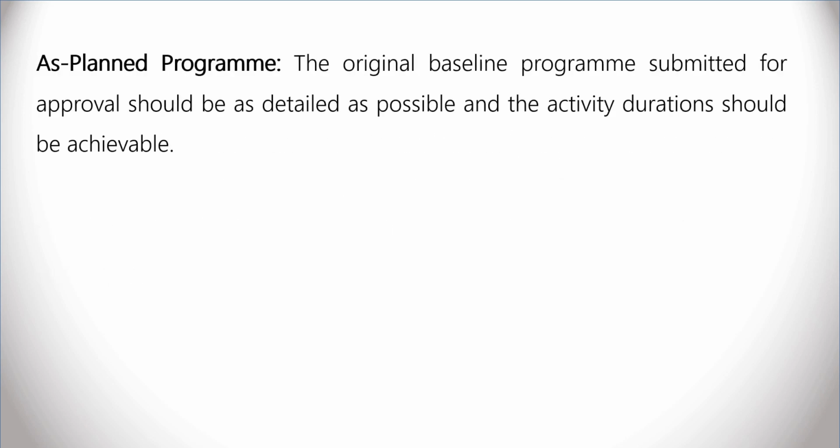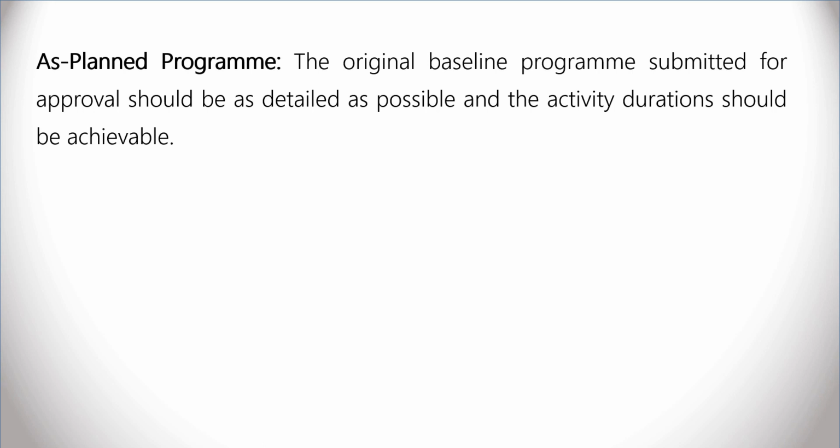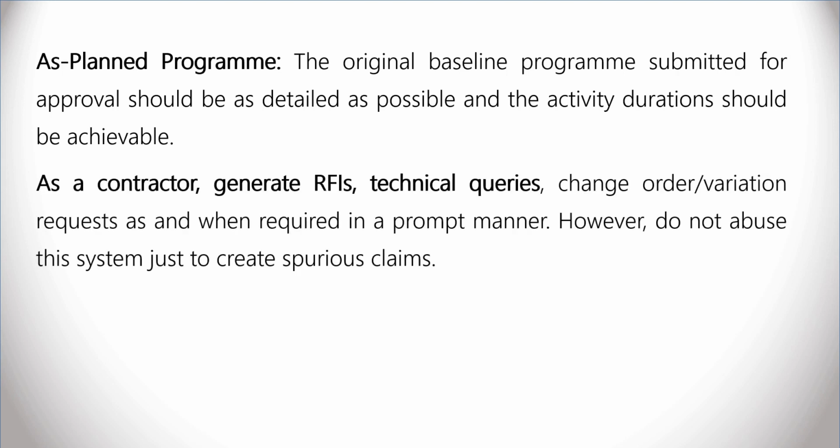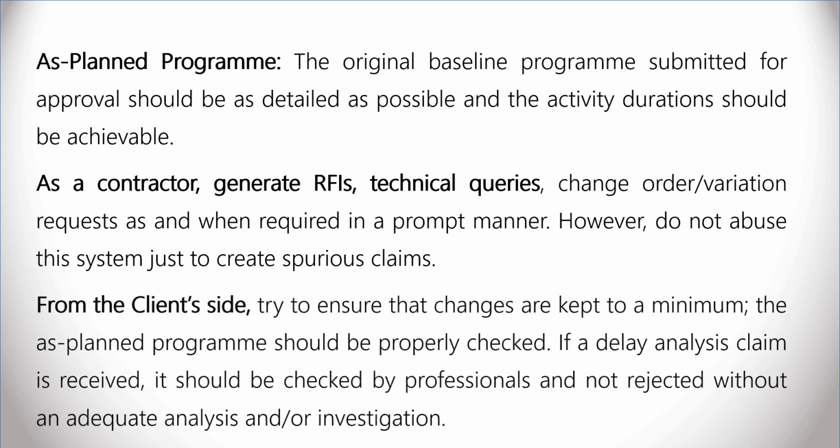As planned program. The original baseline program submitted for approval should be as detailed as possible, and the activity durations should be achievable. As a contractor, generate RFIs, technical queries, change order or variation requests as and when required in a prompt manner. However, do not abuse this system just to create spurious claims. From the client side, try to ensure that the changes are kept to a minimum. The as-planned program should be properly checked, and if a delay analysis claim is received, it should be checked by professionals and not rejected without an adequate analysis and/or investigation.